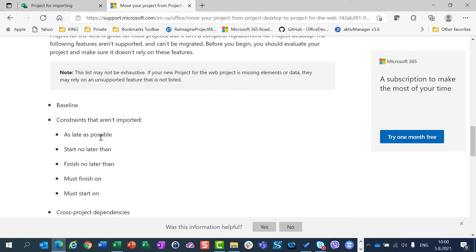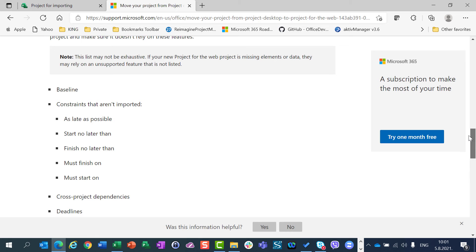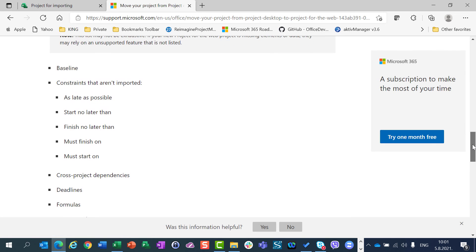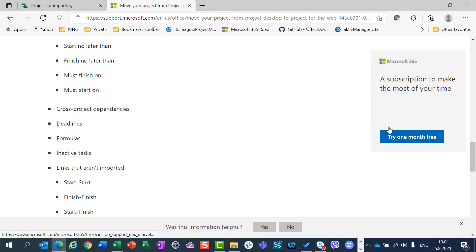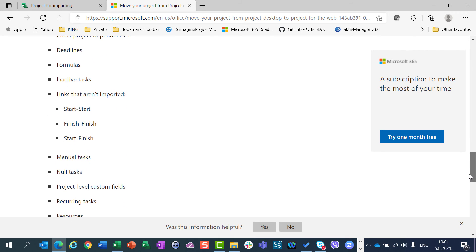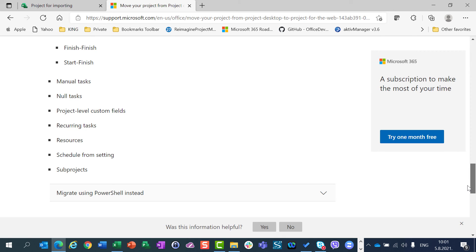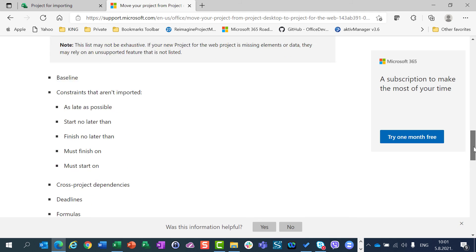Which features are not imported? Baselines, constraints such as As Late As Possible, Start Not Later Than, Finish Not Later Than — though As Soon As Possible and Start As Early As possible can be imported. Must Finish On and Must Start On dependencies are also not imported. Cross-project dependencies are not imported, so if you have dependencies between two or more projects, those are not going to be copied. Deadlines, formulas, inactive tasks, links like Start to Start, Finish to Finish, Start to Finish, manual tasks, null tasks, project-level custom fields, recurring tasks, resources, schedule settings, and sub-projects — those things are not going to be imported.